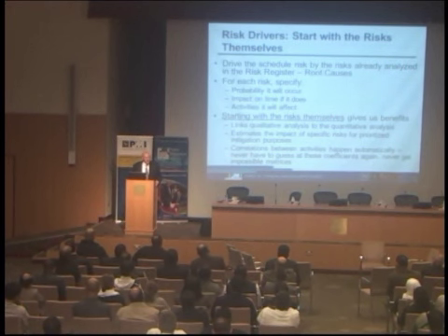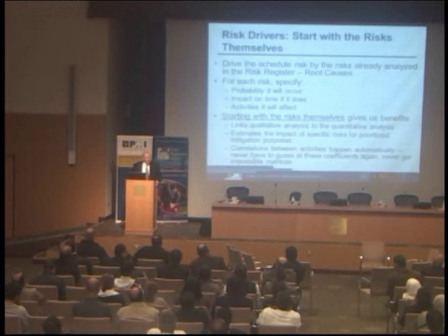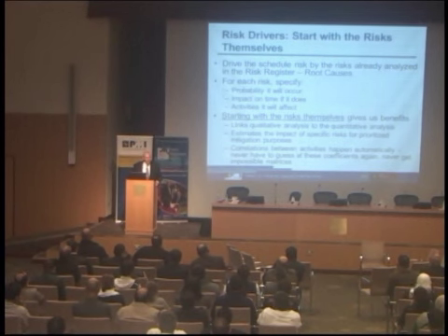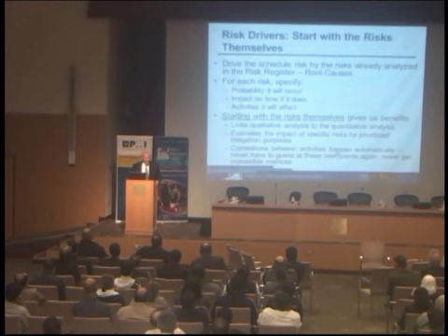And the people in these risk interviews are going to say things like, well, it affects all structural steel, or it affects all piping, or it affects all earthwork, or it affects instrumentation, or something like that. They won't know that my schedule has 1,000 activities or 2,000 activities, and when they say piping, I've got 40 activities that I have to assign it to. But you have to assign it to the basic activities. Interviewee doesn't get that detailed.